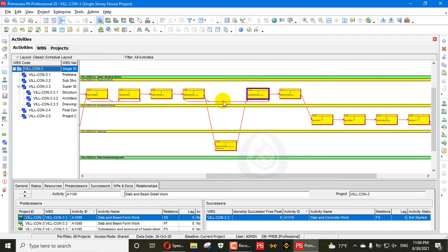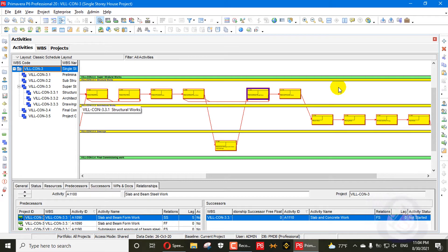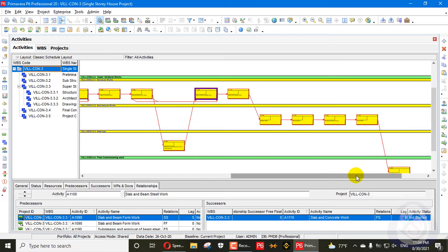This causes confusion and congestion in the network diagram. It does not necessarily result in schedule computation errors, but it increases the number of relationships in your model. Due to this, maybe three or four relationships are assigned to each activity. So if there are a thousand activities, your relationships could be five thousand or ten thousand — that's worse.